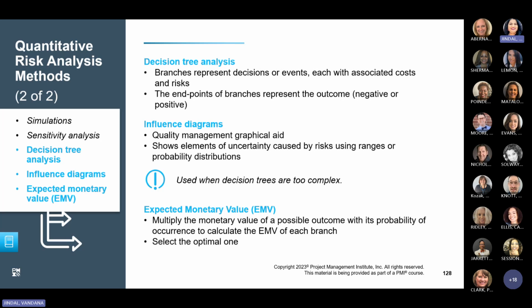That means if the business decides not to launch, their EMV is 0. But if they decide to launch, they will be in profit of about 220K. So you make such an analysis, and based on that you decide what you want to do. In this example, as you can see, the decision tree analysis showed that launching the product has a higher EMV. So it's better for them to launch this product despite the risk of loss.